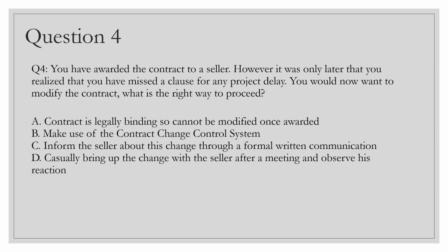I know we have not come into that monitoring and execution piece, change control and all that stuff. But it's a nice question. So let's go to the answers. First is contract is legally binding, so cannot be modified once awarded. Actually, not true. Okay, know this. It's not true. It can be modified, with the signature of the sponsor and both the parties.